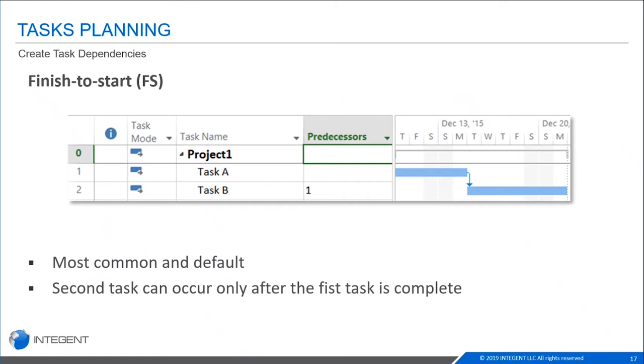So the predecessor task is sometimes called a driving predecessor because it drives the start of the successor task in this kind of relationship. A couple of other examples that I use, since I'm a baker, I use a baking one. So you have to bake the cake before you can decorate it. That is a very good example of a finish to start relationship because you can't decorate it unless you have baked it. And then to do any kind of analysis, you have to first have something built. You need to have a document built out before you can do analysis of what had happened there.